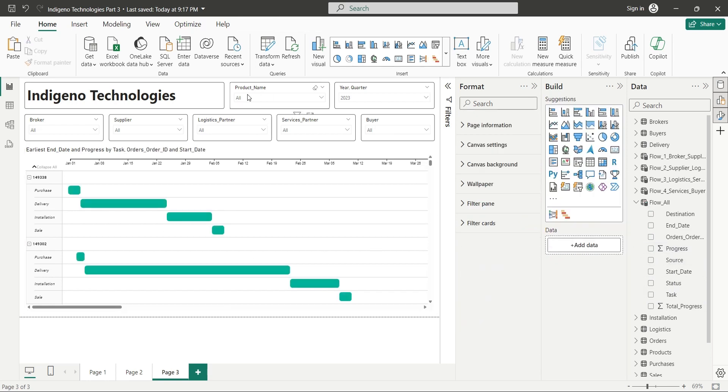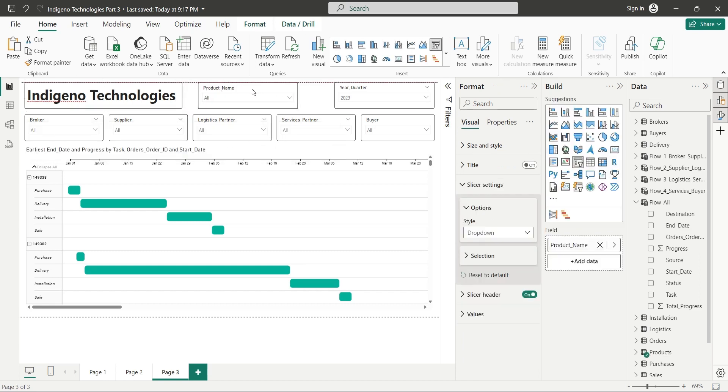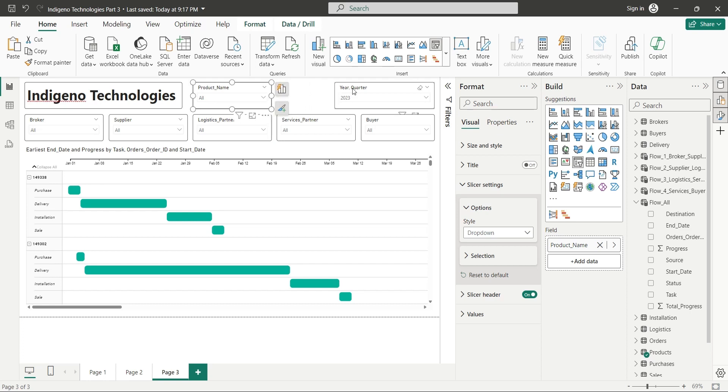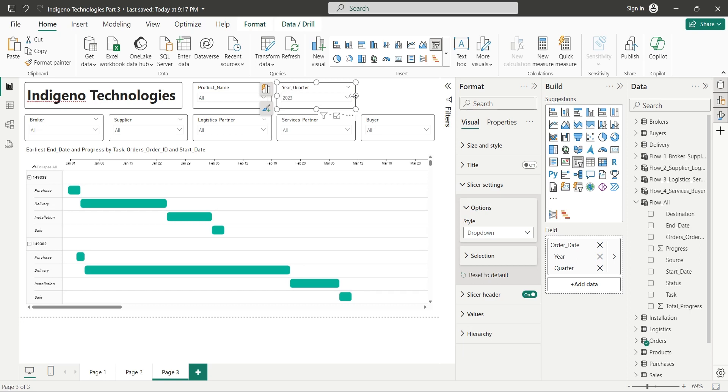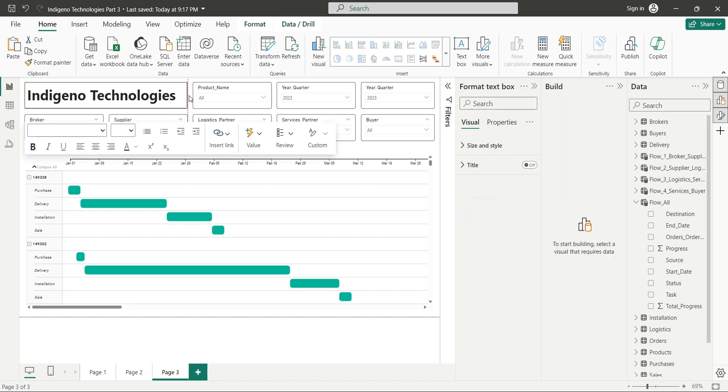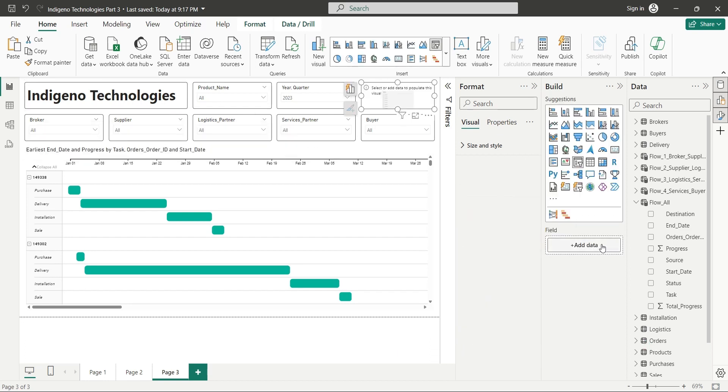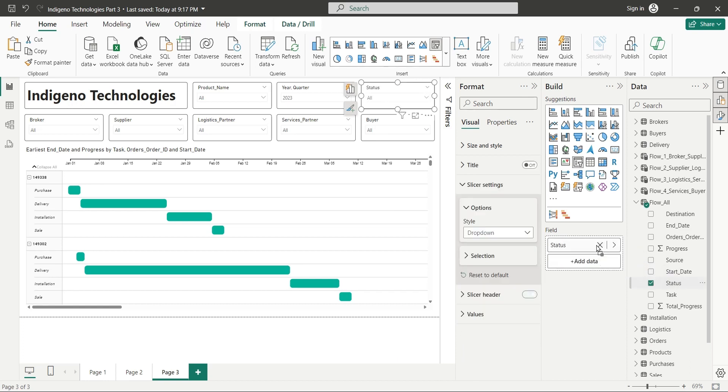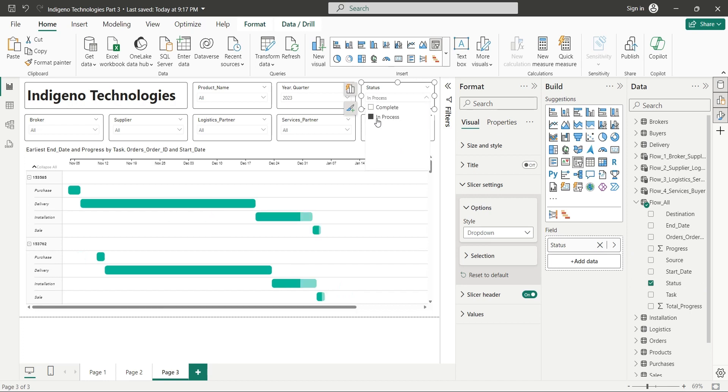We can add another slicer here. Remember, we created a status field which tells us if the sales process is complete or in process. That is very important field, using which we can add a slicer to shortlist and monitor all those jobs which are still in process. We can copy an existing slicer and replace its field with the status field from the flow table. Now we can just select in process tasks and monitor them in our Gantt chart.